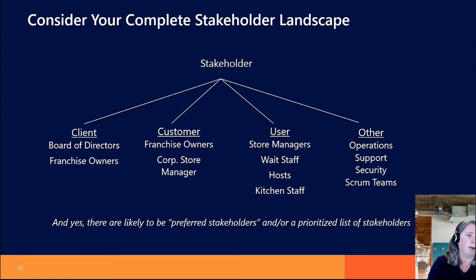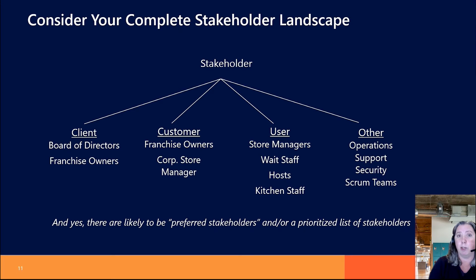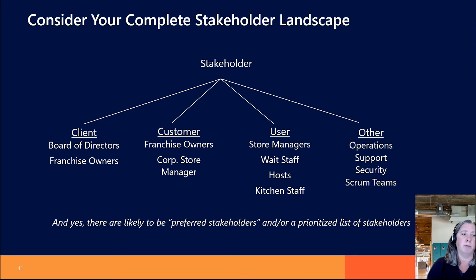Here's another model: clients are the people who provide us with resources — probably money for our project. Customers are people who can accept or reject the work we do — yes, you can release this product, or no, this isn't going in. Users are people who actually use it directly or indirectly. And 'other' includes people inside the organization who have a real stake in what we're trying to do. So let's make sure we understand all of that.